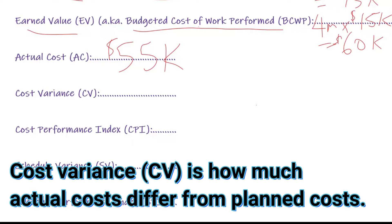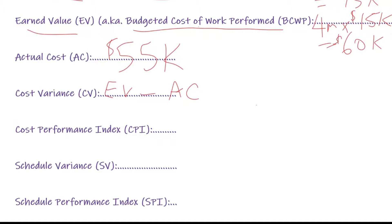Cost variance tells you how much you are varying from the original plan. To solve cost variance, the formula is earned value minus actual cost. Our earned value is $60,000 and our actual cost is $55,000, which gives us a positive $5,000. So our cost variance is positive — we're actually doing well.